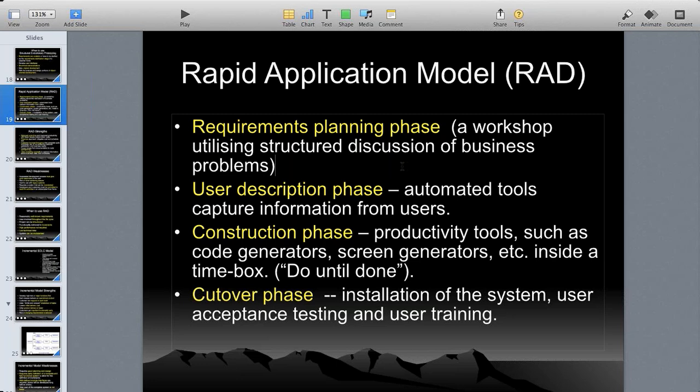So it goes for 10 days continuously, daily 8 hours, 9 hours with some breaks. Of course, we prepare an agenda, so based on the agenda, today this we'll discuss, tomorrow this we'll discuss. The maximum duration is 10 days according to the rule. We can even extend it by 5 more days, we can make it 15 days, but not more than that. So within 10 to 15 days you have to finish the requirements planning phase. You understand what I'm saying?